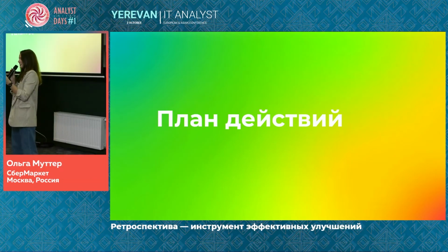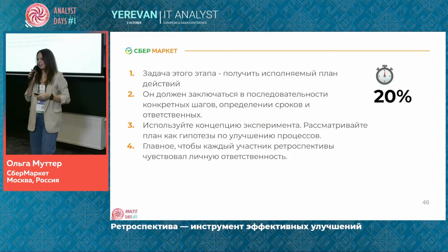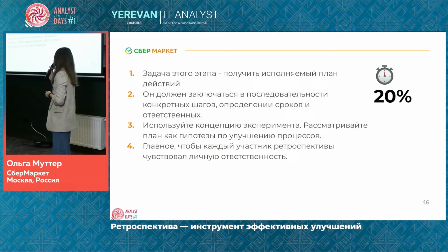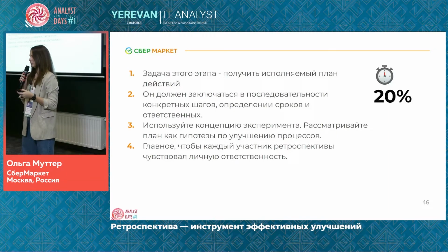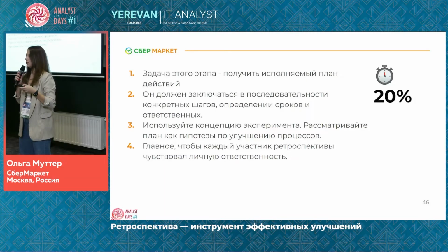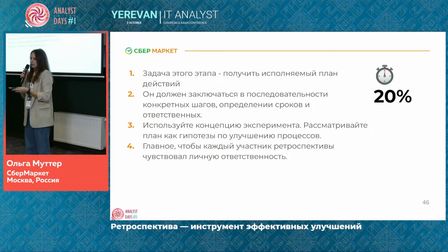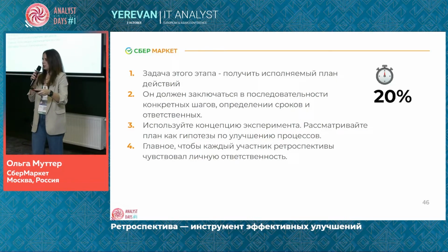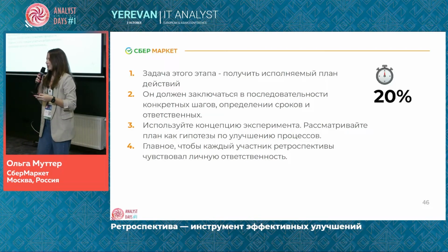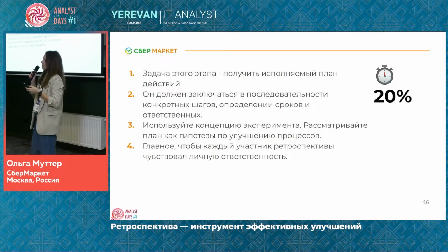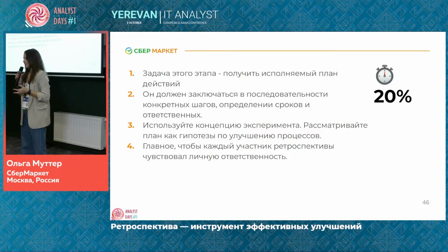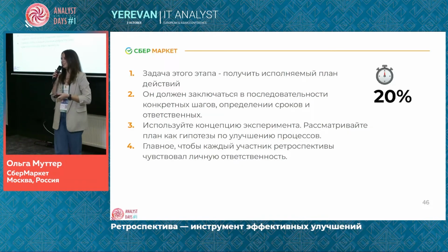They need to identify growth or problems, generate ideas, and they get to the action plan. The main purpose of this phase is to get not only the list of solutions, like review of requirements, for example, but also you mention the responsible person and when this person is doing this, what criteria. We have metrics, again, because you might say this is the list of solutions and nobody takes it, and that's it. You just talk to each other, but nothing changes.